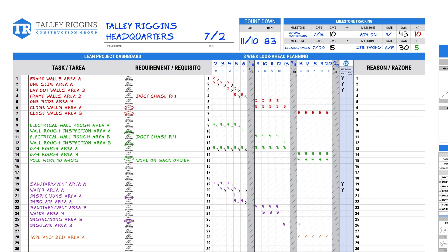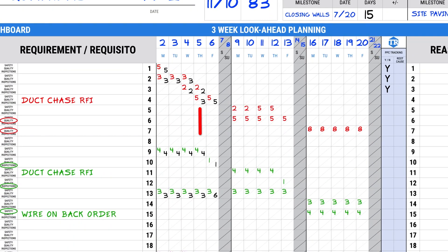It is essential to look beyond the surface. If the task wasn't completed because the trade partner didn't finish, take the time to understand why they didn't finish. As you see on the board, on Thursday the drywall contractor did not have all the committed manpower, but he was still able to complete the tasks committed. This will be scored yes.